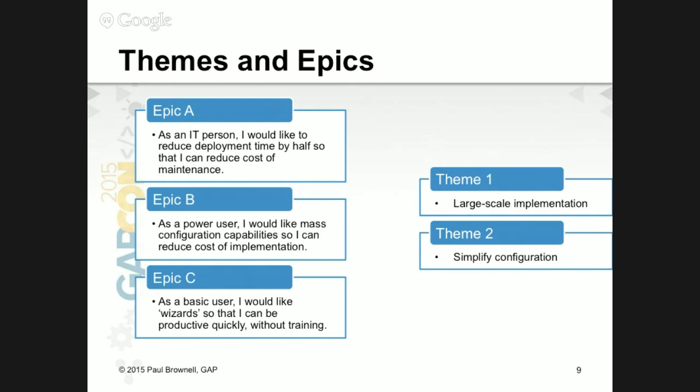So the way we work is that we see epics are way too big to accomplish in a single screen. We use those as containers, and we have a bunch of user stories that relate to that epic. I don't know if that's accurate for you or false. No, that's accurate. Really, both of these can be containers, and quite often what I see is the epic and the child story in a parent-child relationship, with the epic being the container and the user stories being within it.